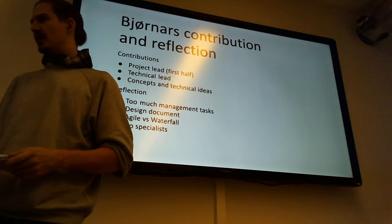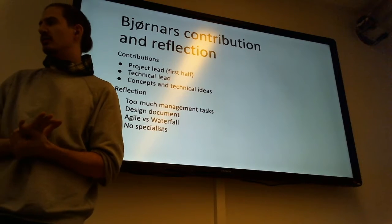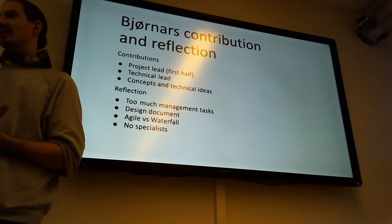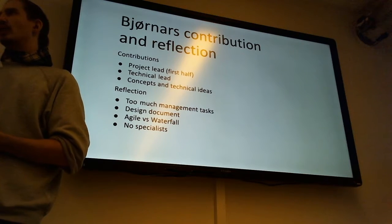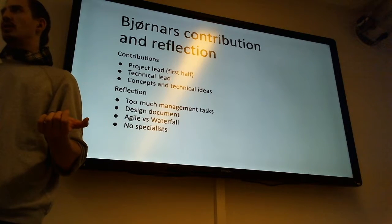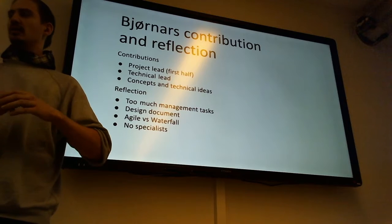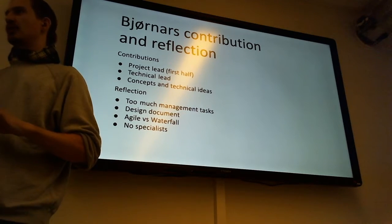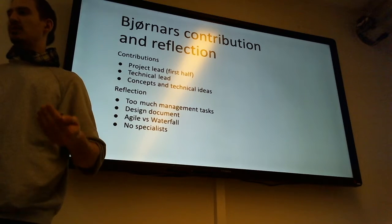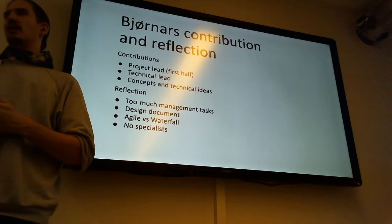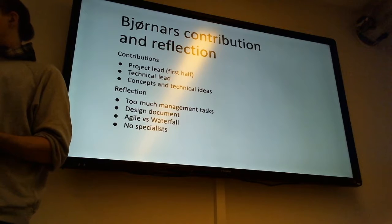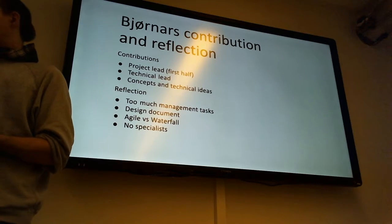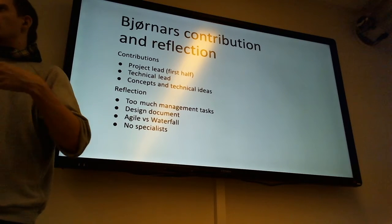I still think for this kind of project, agile versus the waterfall model. This group was not experienced enough to work as agile. We should have reserved maybe the two first sprints, maybe three, to just say we're not going to develop a single line of code. We're just going to agree on the whole structure. Because time and time again we had to redo our structure. We came to disagreements on how to do it. Again, we didn't have a lot of time.